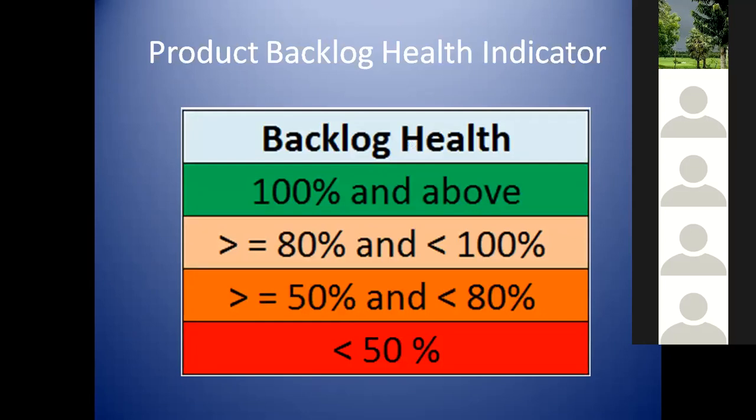Generally, for the sprint closure metrics, or the Scrum level metrics that we use, I personally recommend please add the backlog health, because you are indicating to your stakeholders and the management team that we are staying in this position. Ensure that you show the expected value that we are looking for. So we cannot plan 100% capacity for the sprint execution. We need to increase our refinement hours so that we will be able to manage. This will give you space for expressing that you need more refinement.